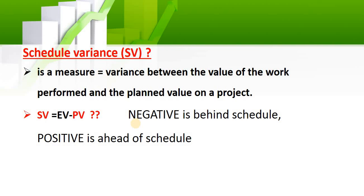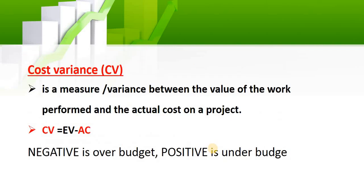Schedule variance, called SCV, measures the variance between what you earned minus what you planned. If it is positive, it means what you have earned is bigger than what you planned, so you are ahead of schedule. If it is negative, what you have earned is less than what you planned, so you are behind schedule. It is very simple — once you understand it you will like it and can practice it on your project.